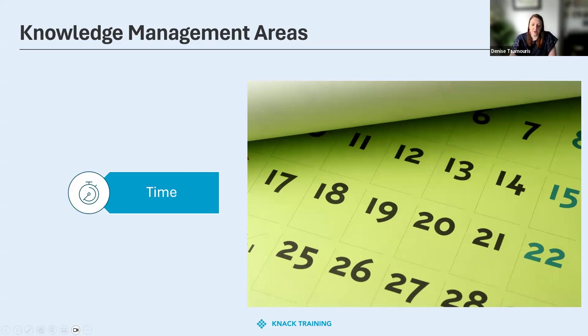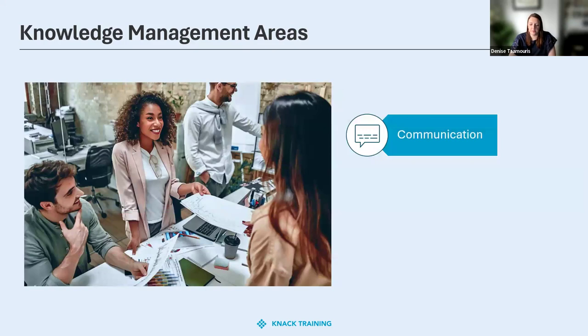All right, the last management area we're going to talk about today is communication. How often have you encountered the request, just keep me in the loop, keep me informed? However, even with this request, essential stakeholders might sometimes be excluded when changes occur. So balancing communication is vital. A well-structured communication management plan is essential for determining who should receive information and when, especially before your project commences.